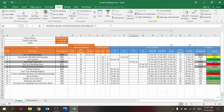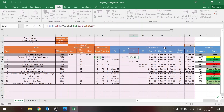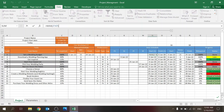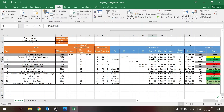The same logic applies for the finish, just looking for a different column. Notice here I'm looking for the start in column P, and here for the finish in column R. I'm then showing what the new start time is — it's the maximum between the two, because you can't have two types simultaneously; it's one or blank depending on the type of dependency.